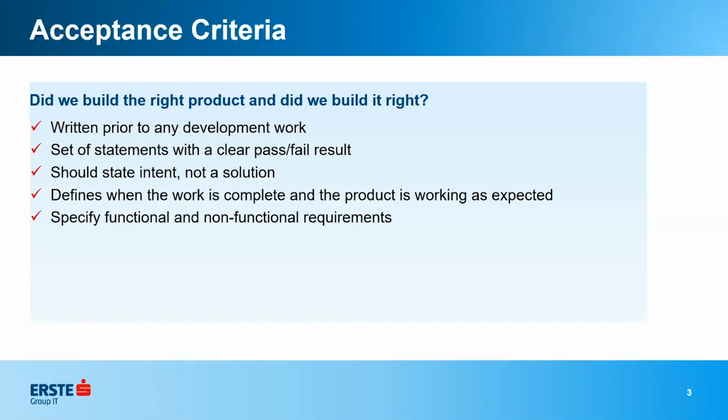And that helps you to prevent the situation where you're done and you're waiting for the other team to do their part, but you can't complete the story because it's not finished yet. So when you have an instance like that, like, hey, we're working on this story and we think it may affect accessibility for the site, you can create a separate task, not a subtask within the story, but a separate task in your backlog to remind yourself or remind the team, hey, when we're done with this, we need to ask this other team that's testing that they need to run a check on accessibility or whatever it happens to be.